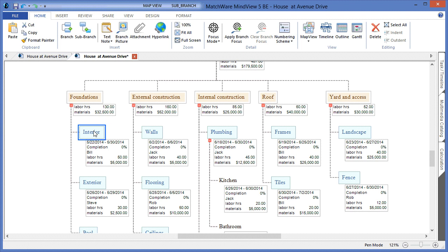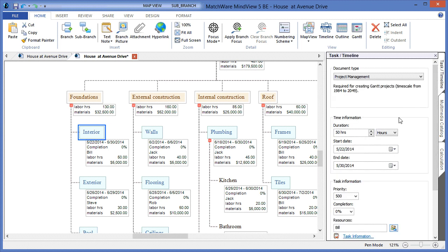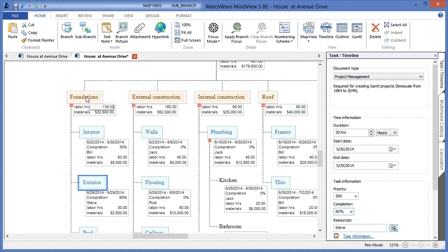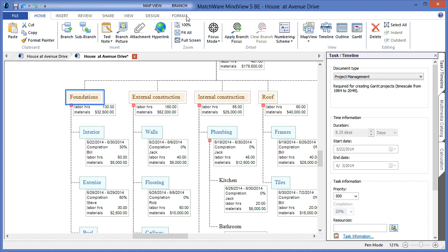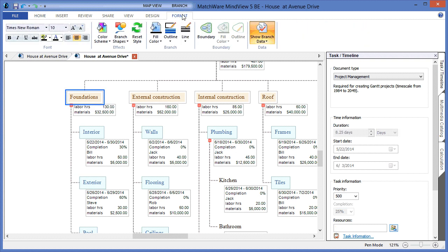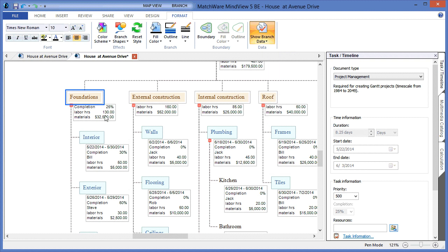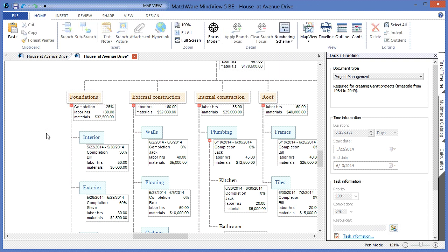As I communicate with Bill on the interior, he lets me know that he's making progress on completion. I can update completion levels. And if I choose to display completion levels on the deliverable, I will see that I have a nice running total, giving me the ability to summarize information from the individual work packet items. You will also take a ratio based on the corresponding task items, and it will let you know from a stage level how far you are with that deliverable.